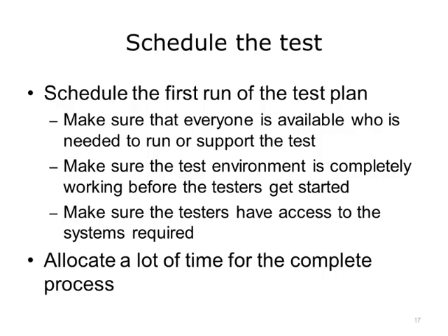Interoperability testing requires a working environment with multiple systems involved. Make sure that the test environment is working, that the testers can access all the systems involved, and that everyone is available who is needed to run or support the test before you start. Remember that testing is a repetitive process in which scenarios are tested, failures are determined, fixes are made, and testing is repeated until you have a working implementation. Make sure to allocate enough time for the full process.